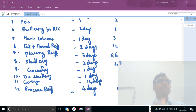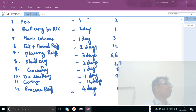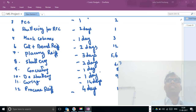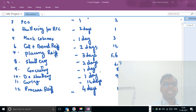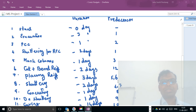Concreting can happen after shuttering (activity 8). De-shuttering can happen after activity 9 — for concrete vertical walls you can remove after a few hours. Curing will start immediately after de-shuttering but goes for 14 days.